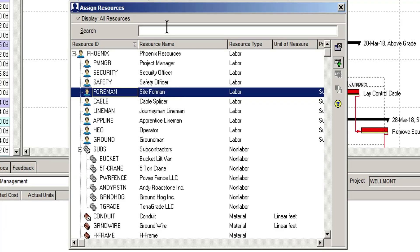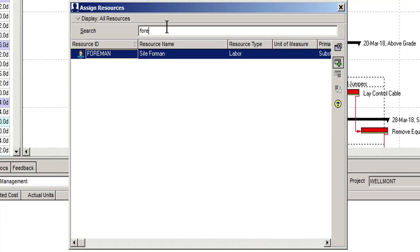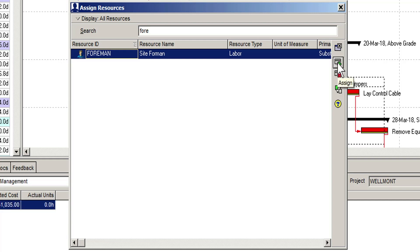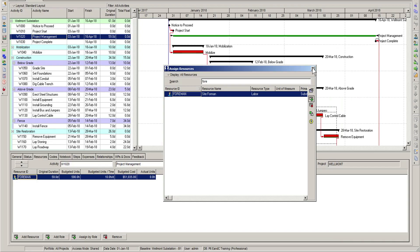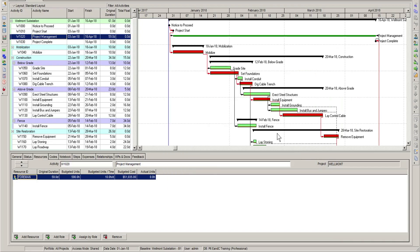In here, we can use the search field to find a particular resource. In this case, we start to type foreman in the search field. We click the assign button to add this resource to the activity. We can now click the close button to view the results of the assignment.